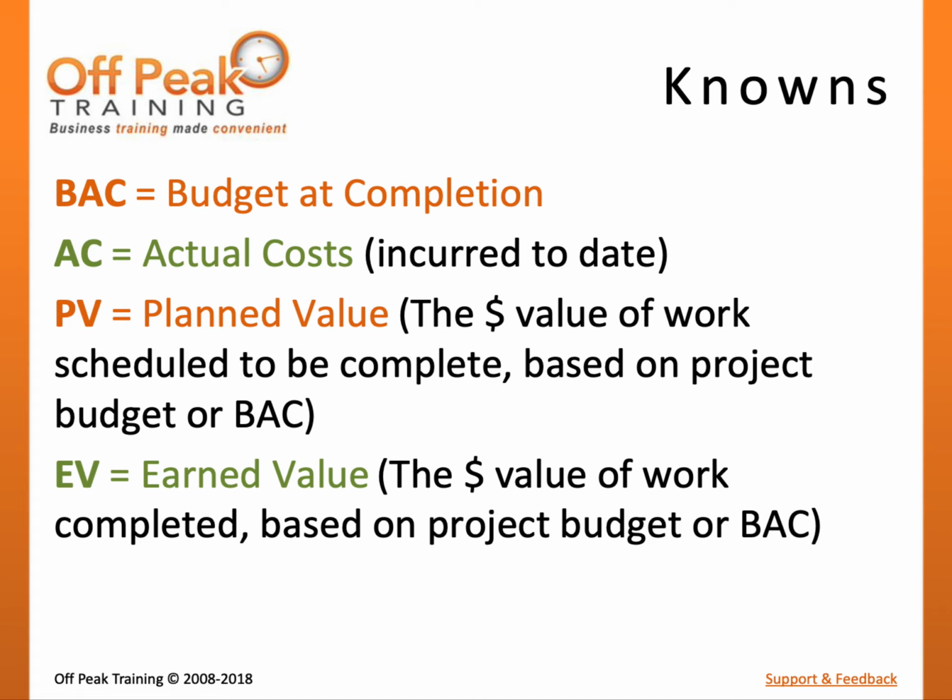In contrast, earned value represents the value of the work that has been reported as complete. By knowing the percentage of work that has actually been accomplished and the budget at completion, the team can calculate the earned value. For instance, if the project was scheduled to take 5 days and cost $1,000, the earned value after 40% of the scope statement is completed would be $400. Simply put, earned value is the dollar value of the work that is completed.